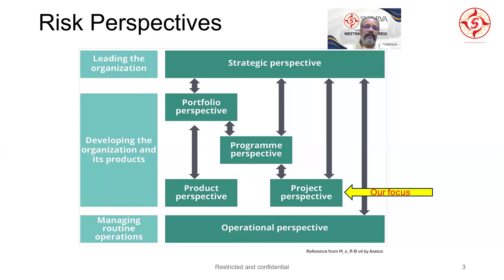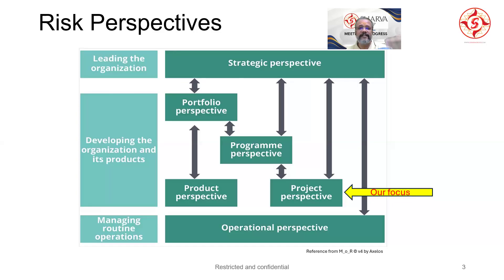For example, if you expect material to be delivered by a supplier and there's a risk that delivery may be delayed by two or three weeks, you want to capture this risk at the task level — not buried in a long risk register — so your project planning, scheduling, resource allocation, dependent tasks, and critical path tasks can all be monitored closely from a risk perspective. I'm going to demonstrate this now.